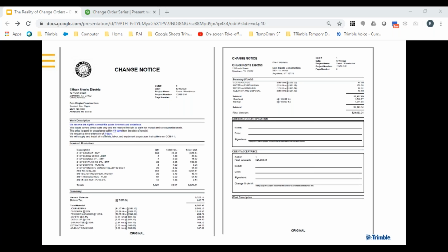Now, where's that labor being picked up? In a lot of NECA labor units, they're being picked up with other elements. You don't always have labor on couplings, as an example, because they have the labor built in with the raceway. If in question, look it up. Look at the NECA referencing. There's a lot of NECA referencing information to explain those labor units. You can always provide a labor unit on those components.